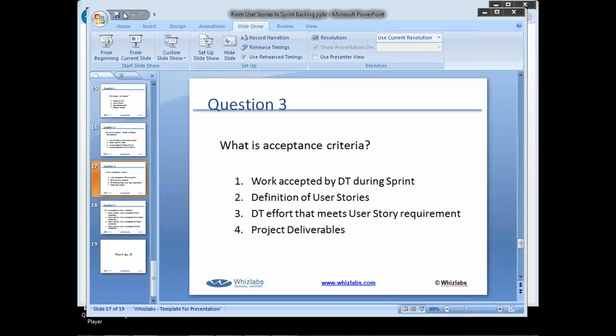So it is up to the developers to meet that acceptance criteria, and it is up to the developers to get further clarification from the product owner during the sprint planning meeting, because that is when user stories are broken down into tasks. Remember, tasks have no user stories in. There may be 20 tasks to a user story, or there may be 2 tasks to a user story, and these may be the acceptance criteria for the user story, which implies that all these tasks have to come together to make this acceptance criteria meet the requirements of that feature, of that user story.